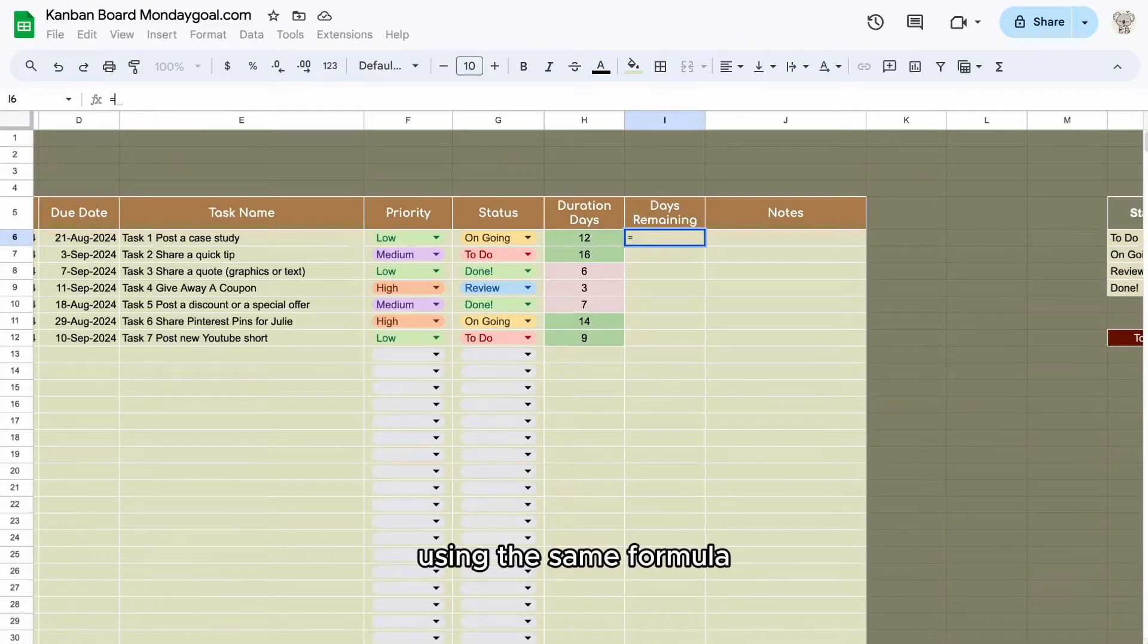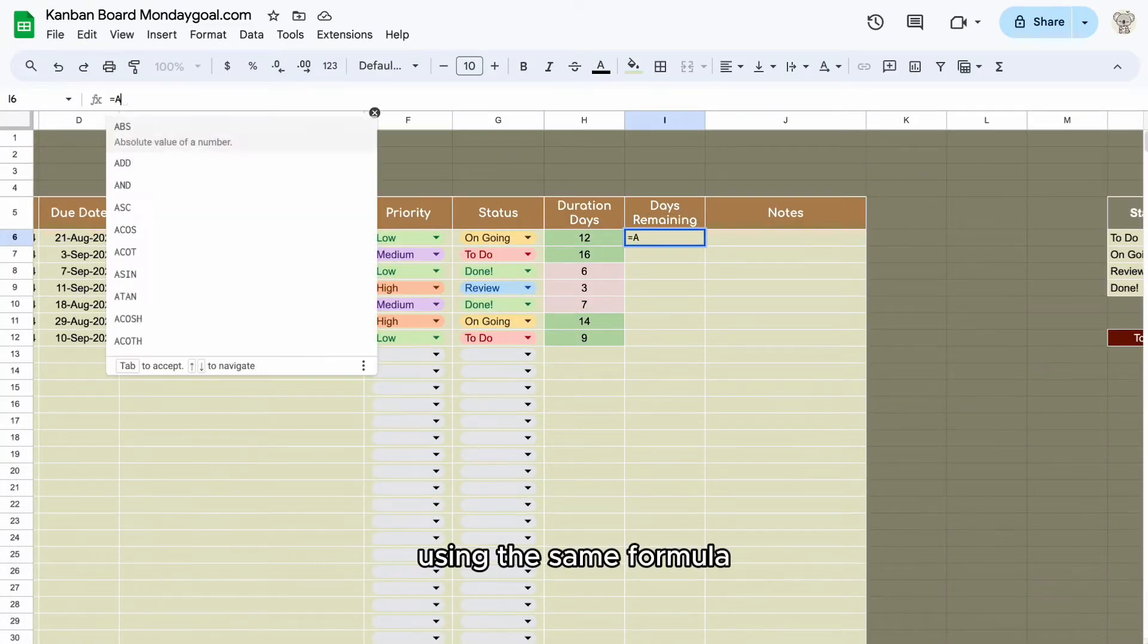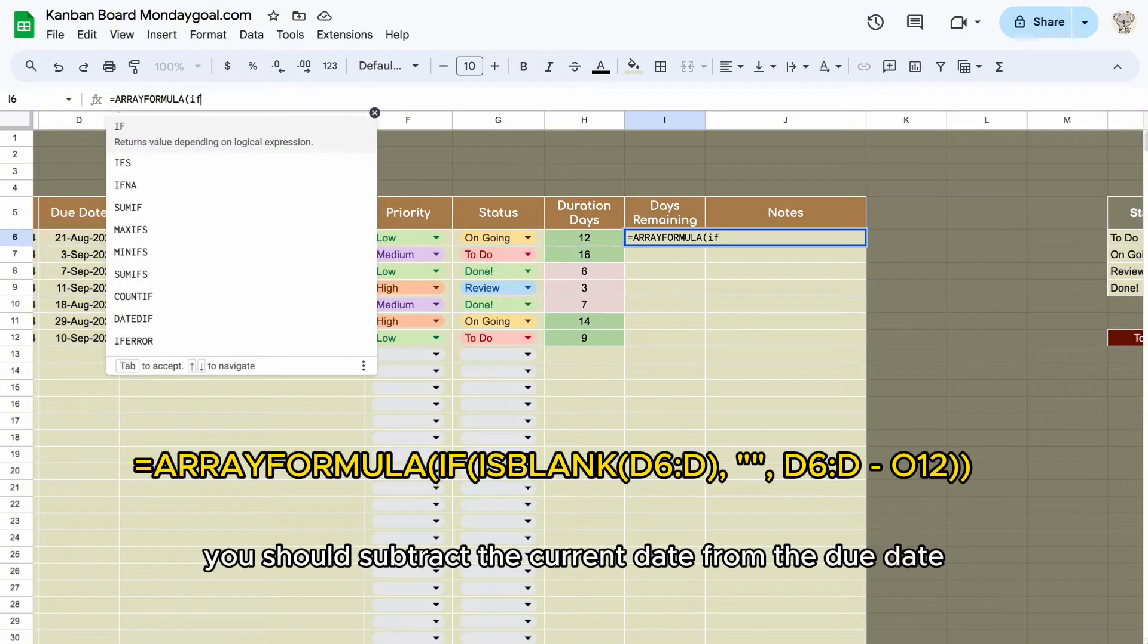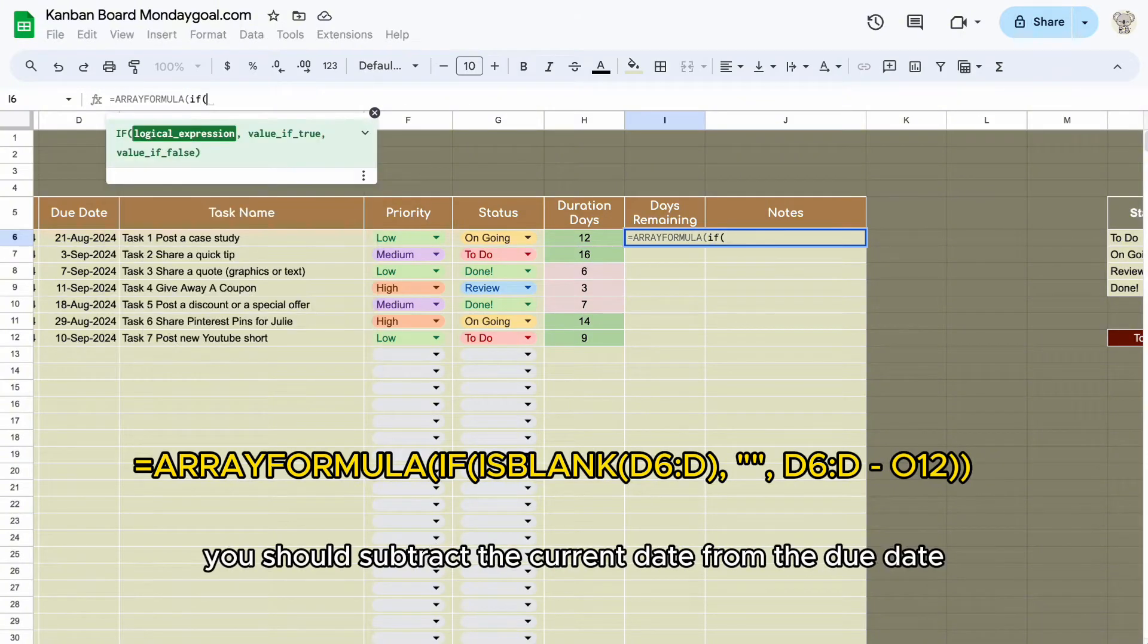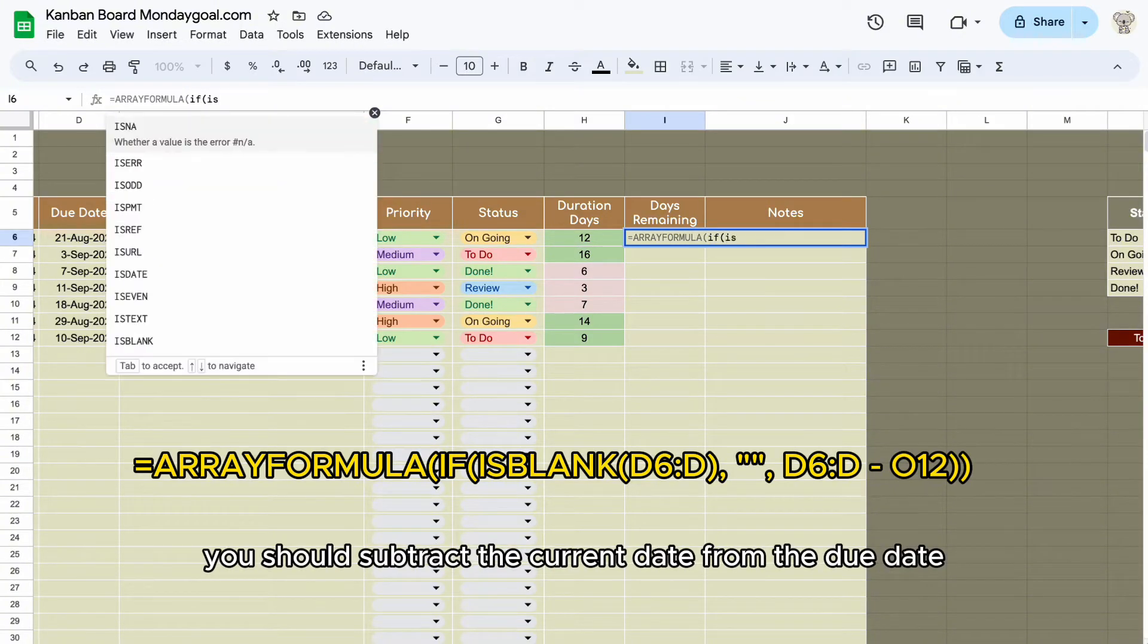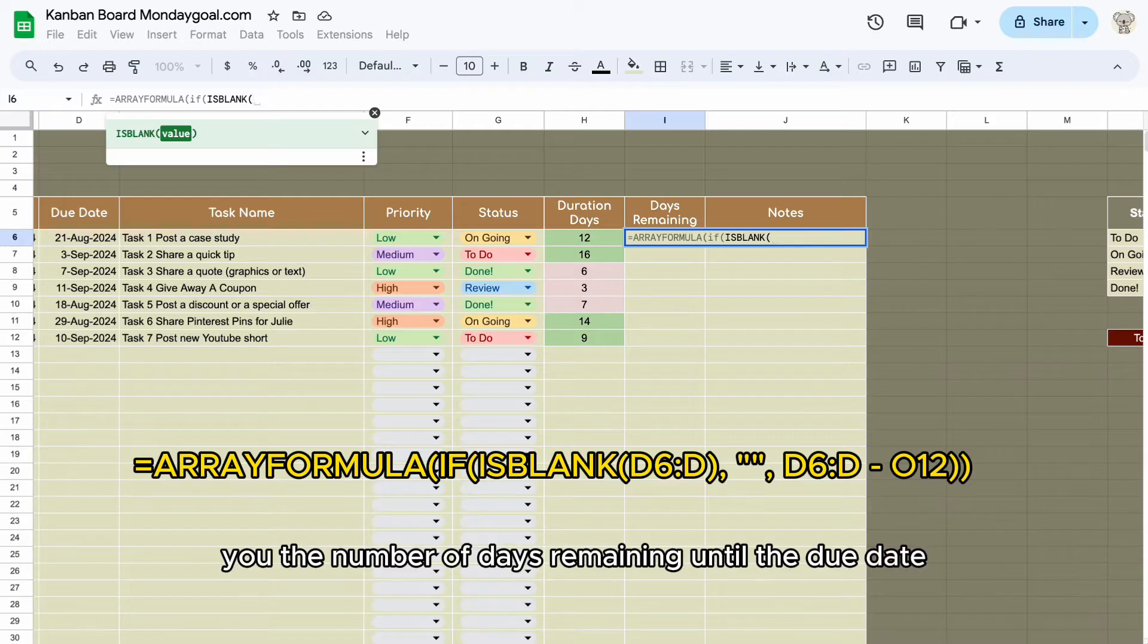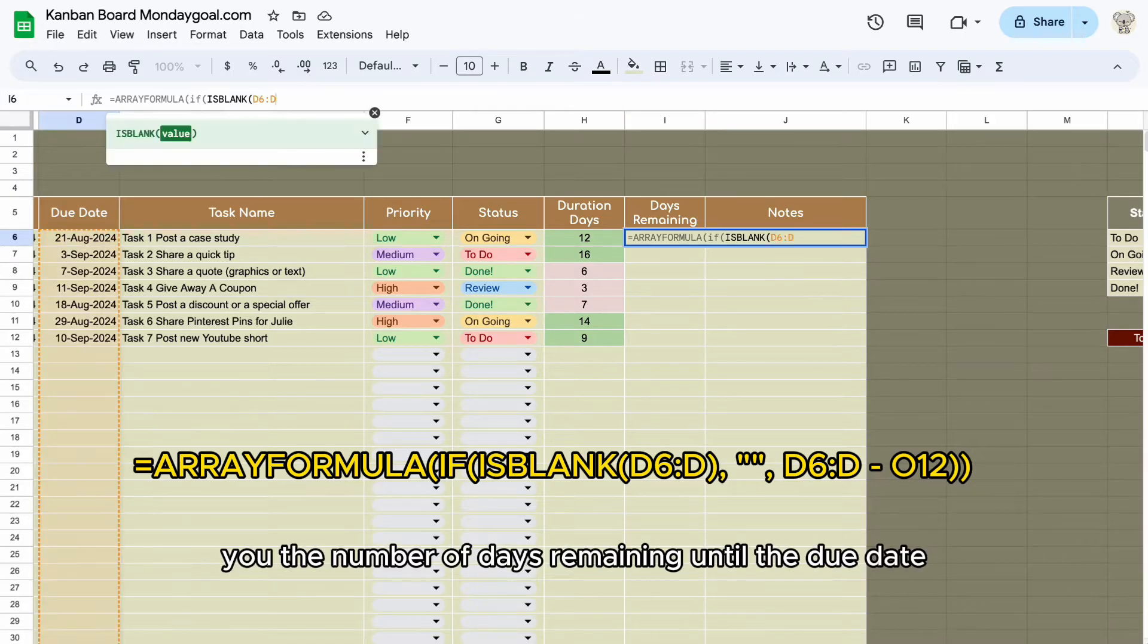Using the same formula to calculate the remaining days, you should subtract the current date from the due date. This will give you the number of days remaining until the due date.